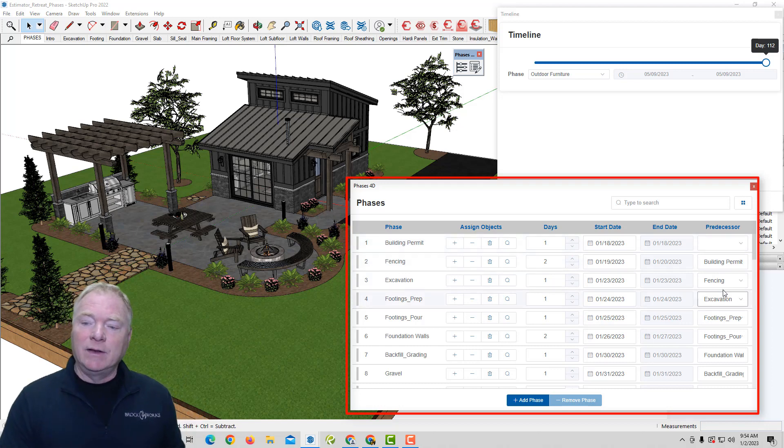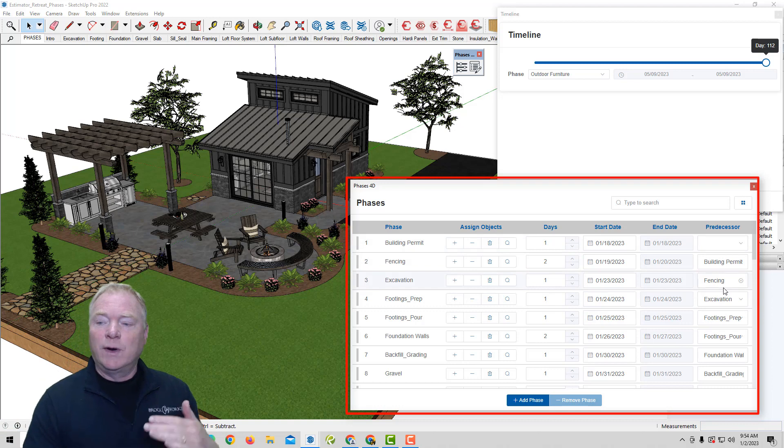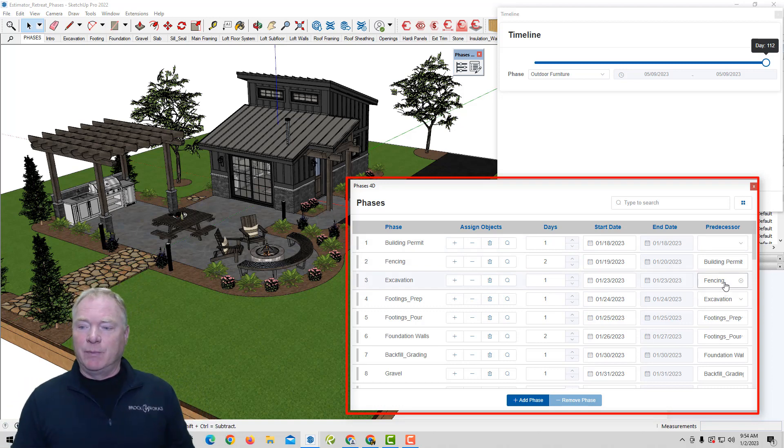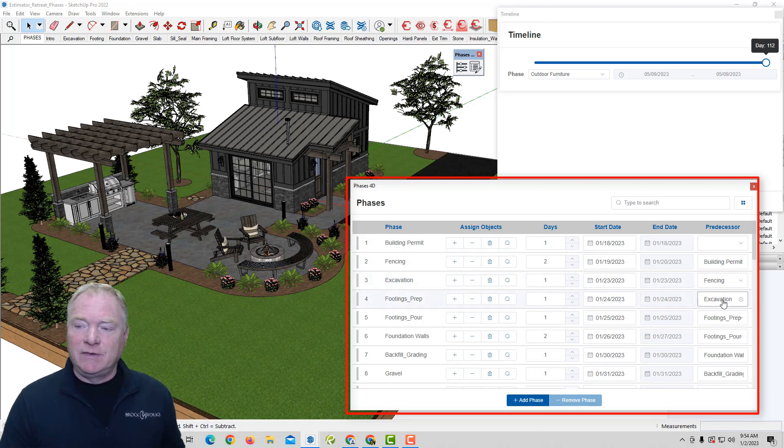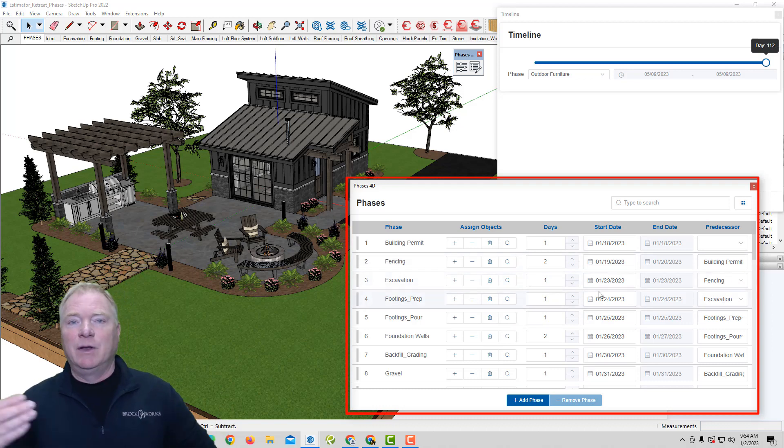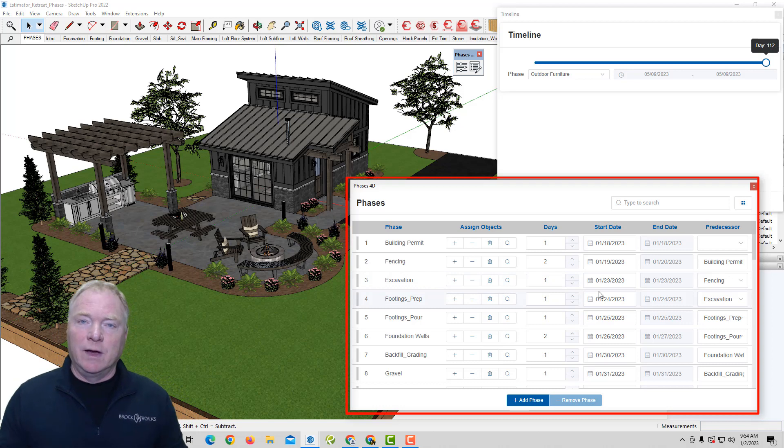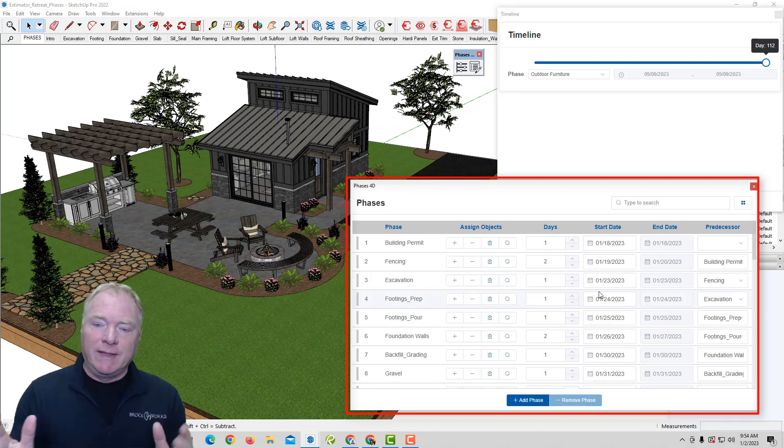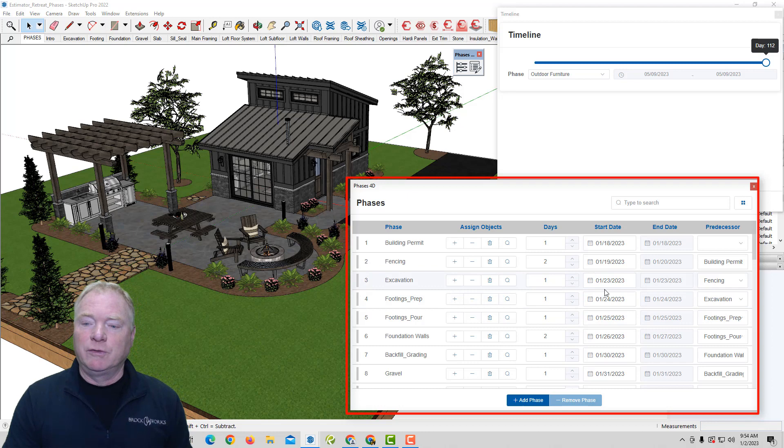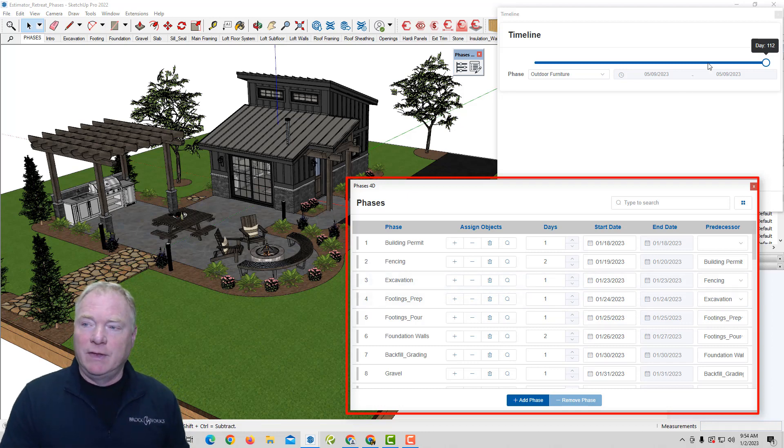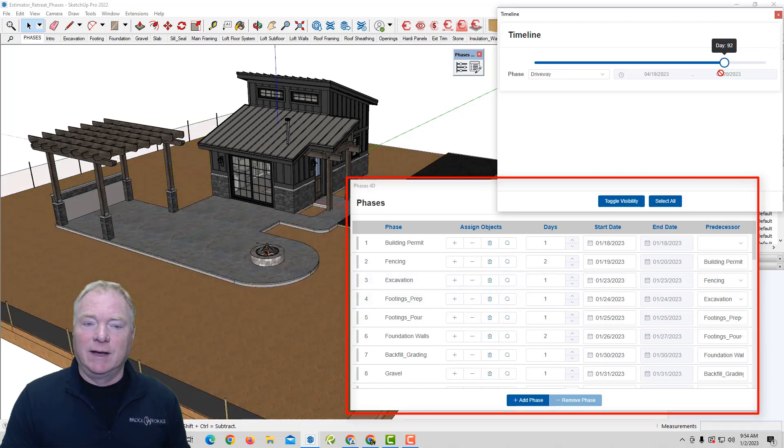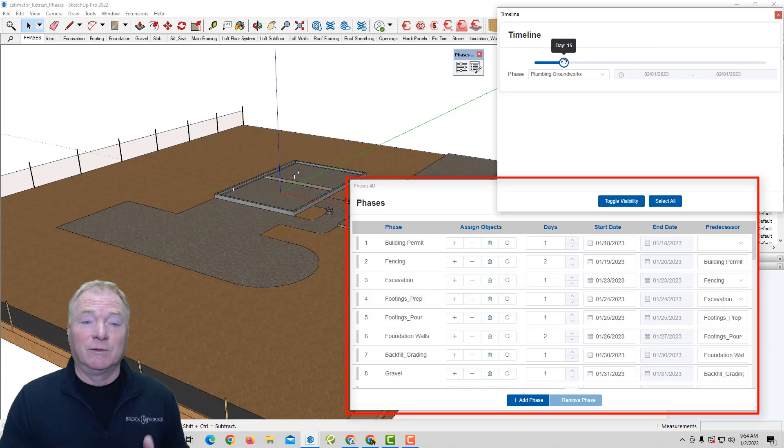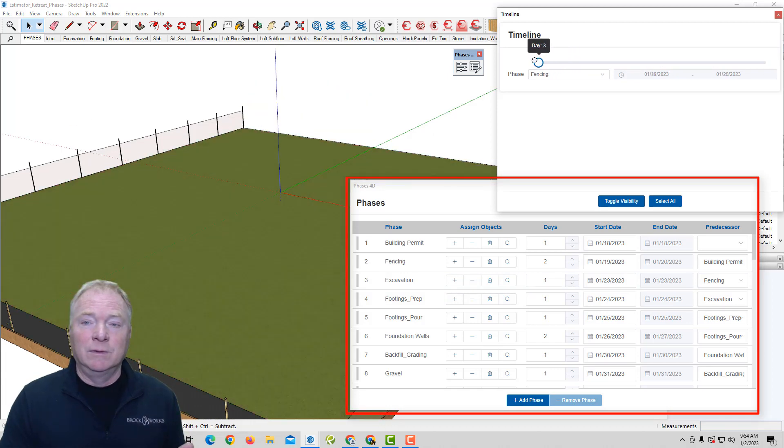First thing we started out was the start date of the project. After that, your predecessors determine the start dates. For example, in our case here, excavation can't happen until we get a building permit, that sort of thing. Footings can't happen until you do excavation. So one before the other, that's a predecessor. So if you're familiar with scheduling, that's how that works. So you can build your schedule out along with your predecessors. And then simply drag the fader over time to see the project, which is really cool.